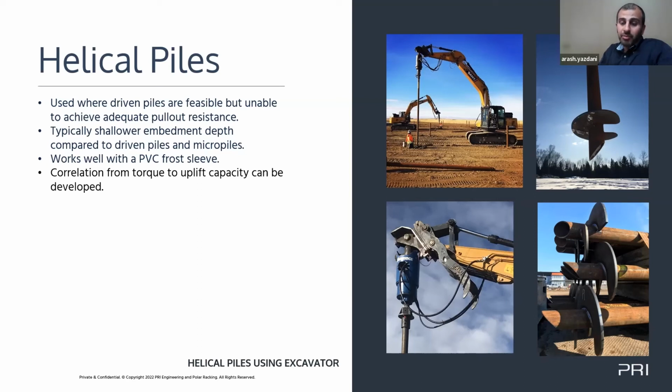From a material standpoint, there's not a lot of additional material, but that welding cost is done by humans, and unfortunately or fortunately, that's an added cost to the foundation. You could look at a helical pile being anywhere from one and a half to double the cost of a driven pile from a supply standpoint. I'd be curious, Dan, from an installation standpoint, is it readily the same production rates, roughly the same kind of equipment for support?